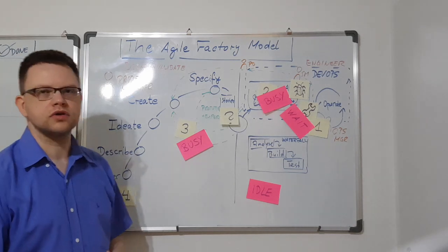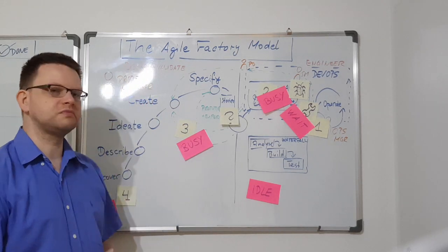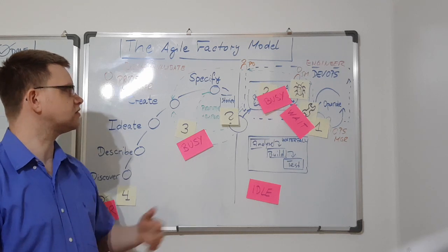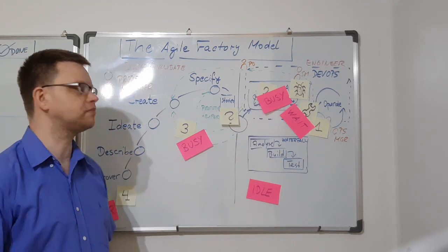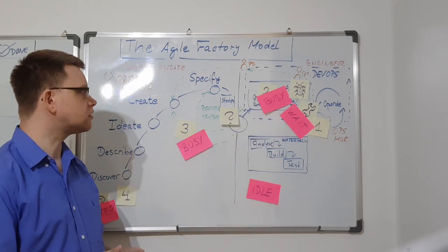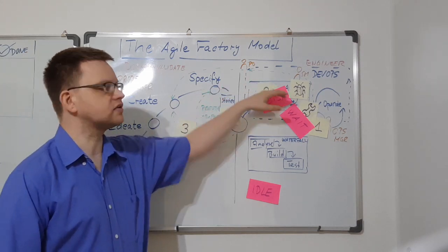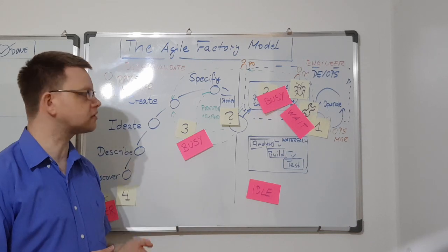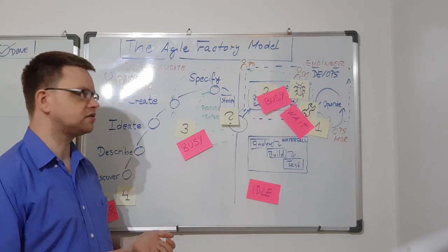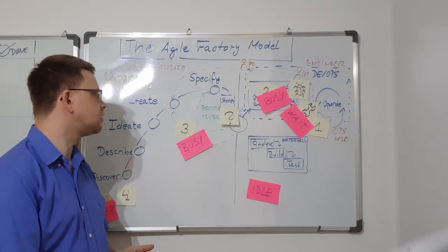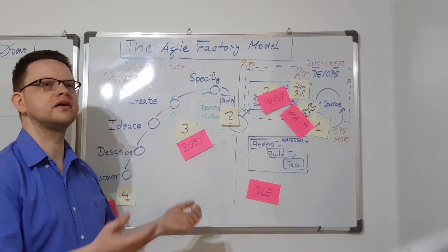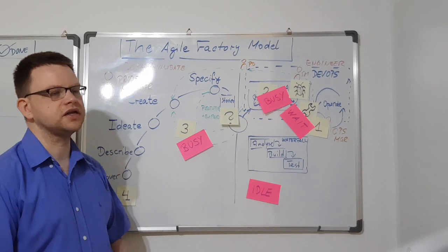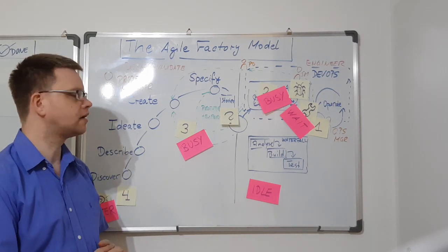So what looks like a very easy and smooth flow from the beginning becomes a nightmare in practice, because those things don't just happen once, they happen all the time. And the more work is actually in process in this chain, the more interruptions you will have, and the more severe the issue of busy, wait, later, and waiting for input become.